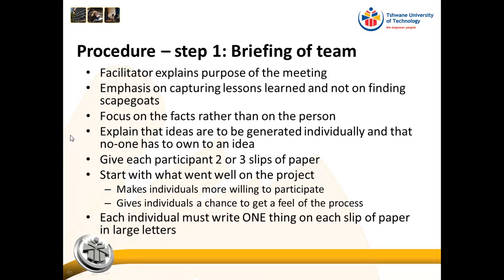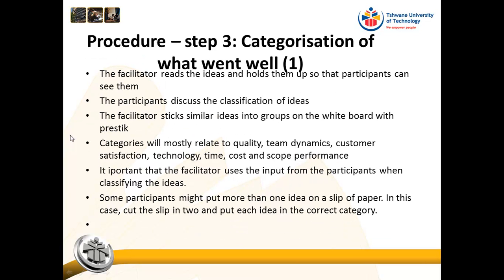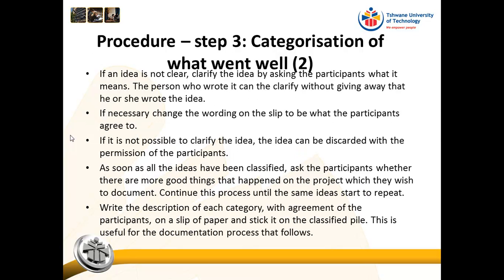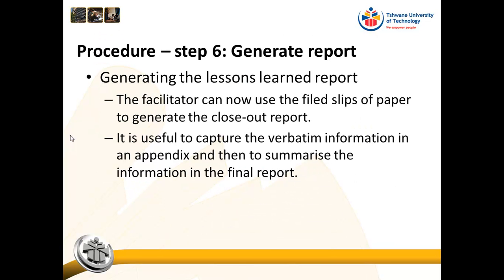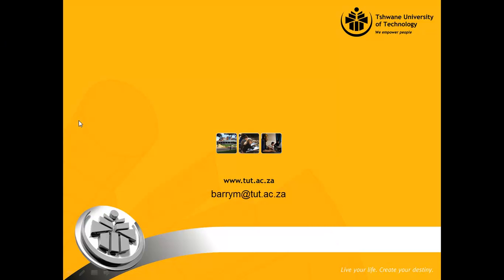The procedures are spelled out in detail in the slides so you can use them in your working environment. You take the slips of paper to generate the closeout report. It is useful to capture the verbatim information — the actual words used in the session — in an appendix, and then to summarize the information in the final report. That, ladies and gents, is basically what project closeout is all about.